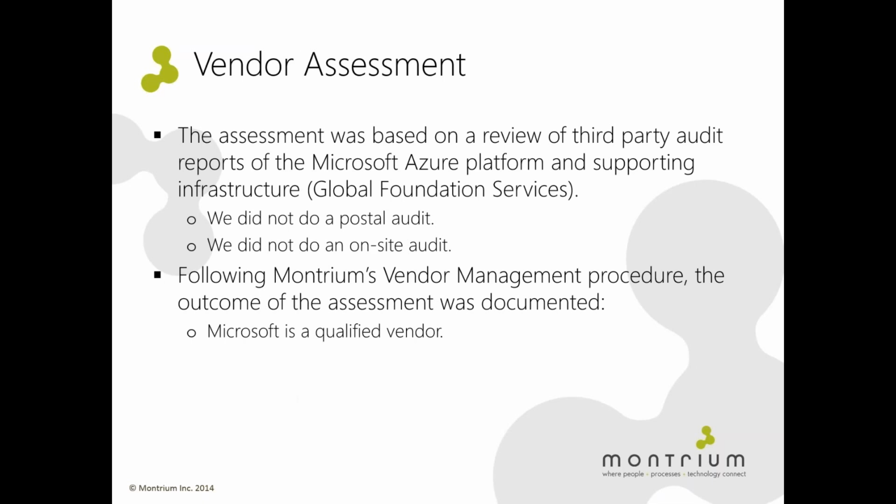And then we followed our internal vendor management procedure to document our findings of the review. We used our vendor assessment form to document our findings, and in the end, because we were satisfied with what we found, we essentially qualified Microsoft as a vendor for us. Our intent is to repeat this process periodically just to make sure that Microsoft maintains its certifications and continues to respect the quality standards. This is important because the certifications and audit reports are only valid for a fixed duration of time, and they would need to be reissued periodically. And so from our end, we want to make sure that they are on top of their game.